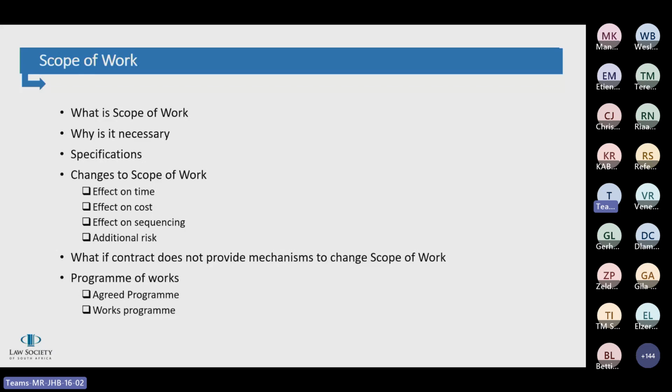It can lead to waste or double work. So for instance, if you'd already done a portion of the work and you now have to either break that down or redo it because that specific work has already changed, that will lead to waste or double work, and it mostly does lead to disputes.